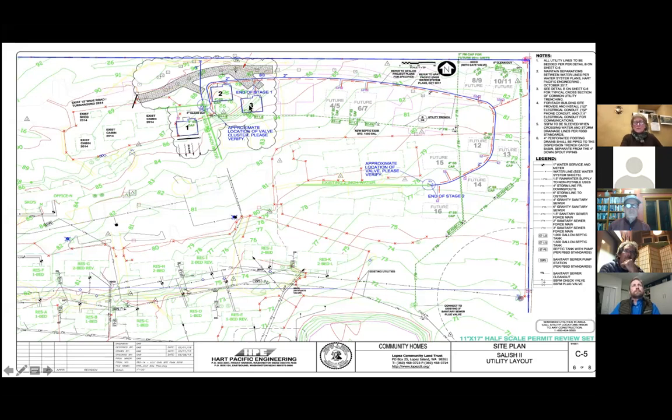So when the surveyors come in at the end of your project, and we move these houses just a little bit, we actually want that surveyor to go ahead and give us these corners, and we want them to redraw this line. And that is what you call the as-built, because it is the drawing as it was actually built, as opposed to as it was designed.